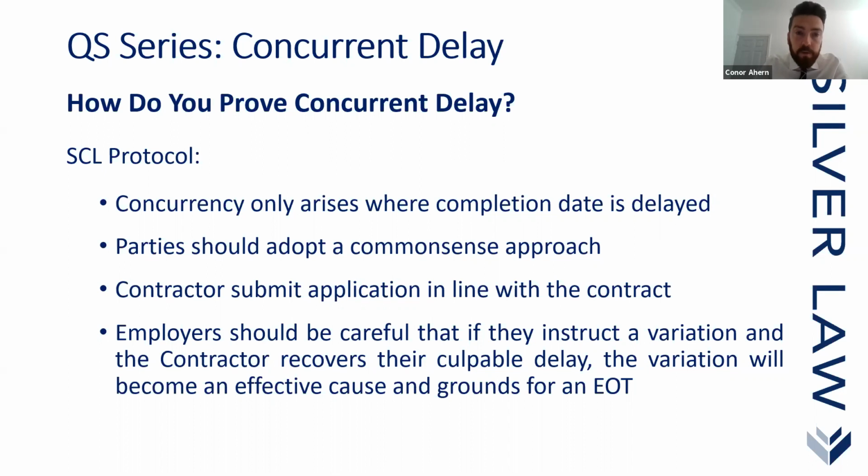What the SCL protocol is saying is that concurrency only arises where the completion date is delayed, and that is 100% correct, because if the overall completion date hasn't been delayed, then the extension of time provisions really kick in when the overall completion date has been delayed, because that's when the problems arise: you're going to be on site for a longer duration, and if the contractor is late, he's going to be liable for LADs.